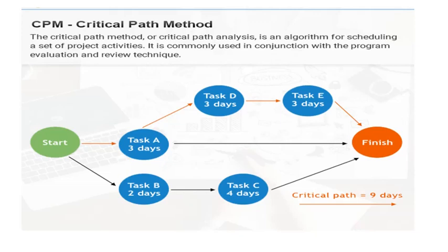Then we need to sequence them in a specific order. Once we sequence them, then we can start adding the durations to it by drawing a critical path method diagram, right? So at this point, some stages of this project cannot begin until the others are finished, right? So these are referred to as dependent.